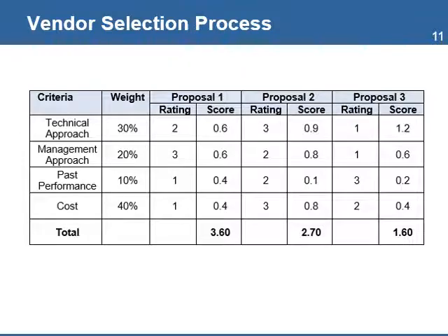The table shows an example of a proposal evaluation sheet that the team can use to rank the proposals and select the best one. The criteria identify the key areas to evaluate each proposal. The criteria are given a weight that is then used to rate each proposal. The proposal with the highest rate enters the negotiation process.